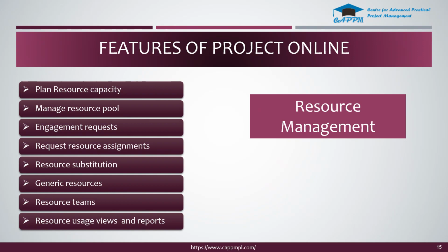And you can also create generic resources. In some cases, you'll not be able to identify which particular resource to be set for that particular project. So instead of holding that particular resource till that time, you can assign the generic resources.